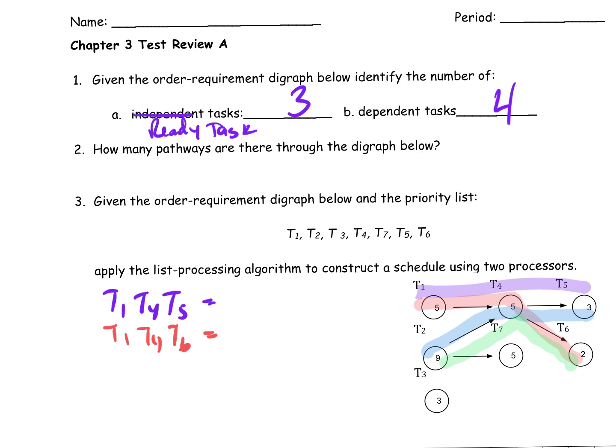You should be able to tell me how many pathways there are through this diagraph. There are two different ways you can do this: you can either list them, because you've got to list them to find critical paths, or you can take a colored pencil or highlighter and draw through your diagraph and count them that way. I started drawing through here — the purple is T1, T4, T5.